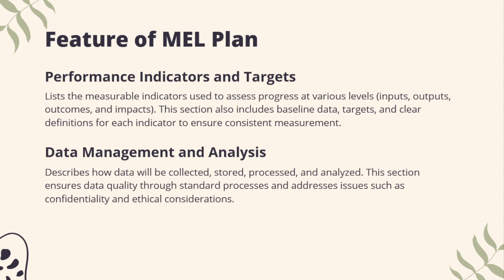You also need to develop what we call the indicator reference sheet. This is going to give a detailed explanation of the indicators, their definitions, their targets, who's responsible, their data sources. Everything will be outlined in this section.